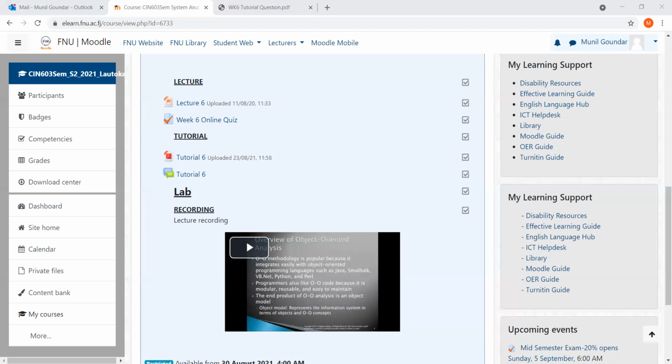So start is the 1st of Jan, so the finish date is going to be 1 plus 4 gives you 5, minus 1, which is the 4th of Jan 22. After that, you'll see that activity 2, the predecessor is 1, takes 5 days. It doesn't say whether 5 working days or 7 days as working days. So if it doesn't say, you'll consider all days as working days. Okay, so activity 1 finished on the 4th, so start on the 5th of Jan 22. And 5 plus 5 gives you a value of 10, minus 1 will give you a value of 9. So 9 Jan 22.